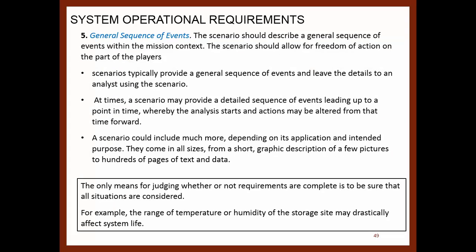And finally, 5. General sequence of events. The scenario should describe a general sequence of events within mission concepts. The scenario should allow for freedom of action of the players. Scenarios typically provide a general sequence of events, with the details left to analysis using the scenario. At times, a scenario may provide a detailed sequence of events leading up to a point in time, whereby the analysis starts and action might be authored from that time forward.